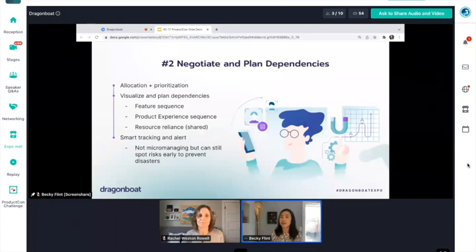And when I say dependencies, quite often people think about, oh, I have dependencies because I have to do A first and B next. It's sort of like a project management sequence type of dependency. Yes, that's one type. The other, the one we mentioned earlier, is a feature dependency. You work on this, you work on this. But there is also resource dependency. My team depends on, the consumer team depends on, let's say, the risk team to do some of the work, or vice versa. So now you start to have the portfolio level dependency.